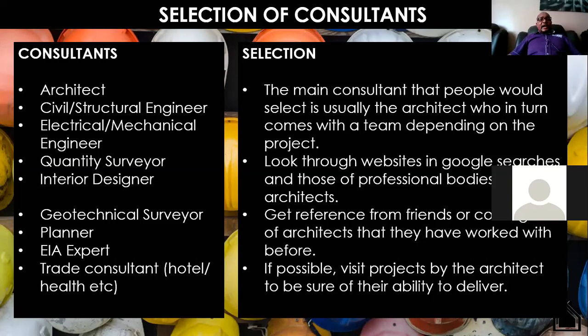The quantity surveyor would then pick up all that information and quantify it into quantities, and give you cost estimates. So the end product of a quantity survey is usually the bill of quantities. And a bill of quantities has two critical purposes. The first one is to allow you as a developer to have a very good idea of how much it would cost you to put up your project. Then secondly, quantity surveyors would produce another document which you call the blank bill of quantities, a document which you use to procure building contractors. So you'd get the document and give it out to maybe two or three contractors and ask them to give you quotations, and then you evaluate and see who possibly serves you best, and then you select. This is a process that the consultants are definitely able to help you out with.